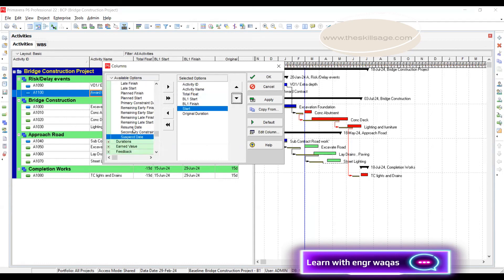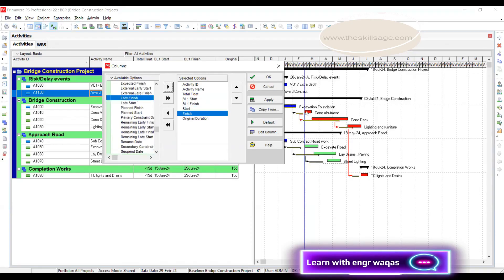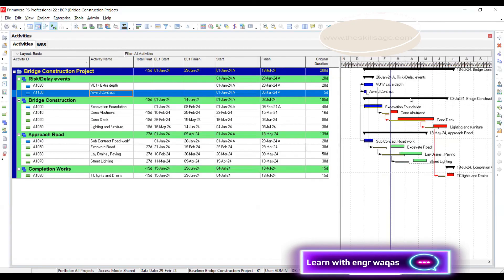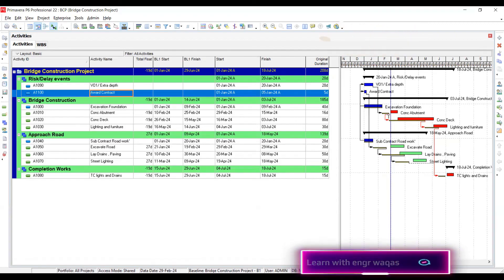Stay patient as this is a focused technical topic. You can analyze the impact: your project is now ending on 18th July. You can add planning date and real date columns. There are also two bar types visible in the Gantt chart — the thin yellowish bar underneath is your planned baseline bar, while the other bar represents the updated schedule — showing the visual before-and-after comparison.